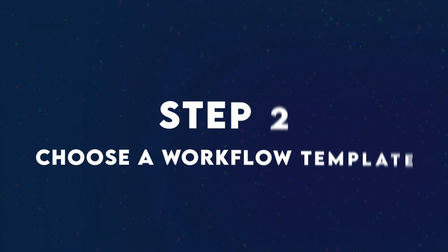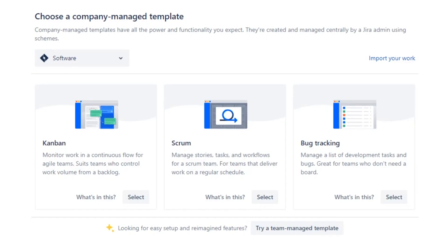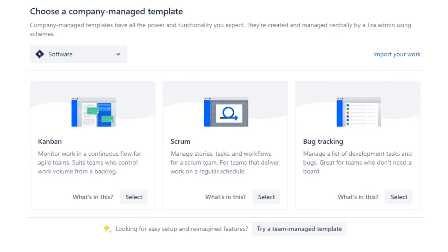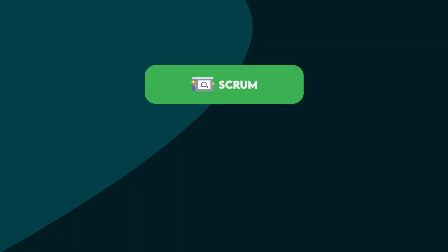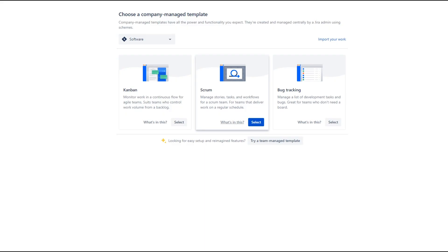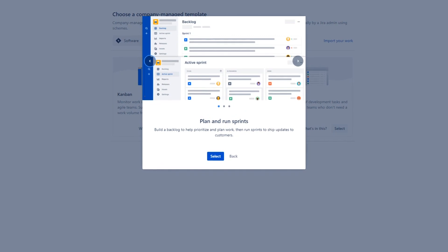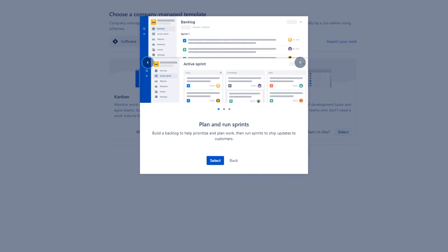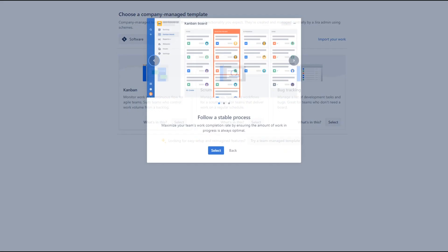Step two, choose a workflow template. There are three main templates you can choose from based on your project management style: Scrum, Kanban, and bug tracking. Scrum is for agile teams that work from a backlog, plan and estimate the work sprints, and deliver work on a regular schedule.